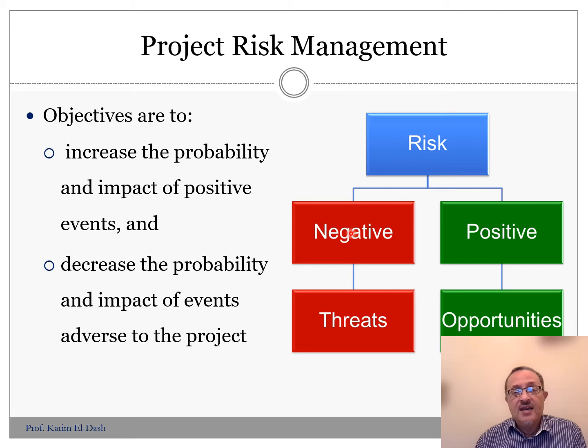And for sure, it is a negative risk. How about positive risk? The opposite. How about if the prices are decreasing like 20% or 25%? Actually, it is very rare, but it might happen. If the prices are decreasing like 1 or 2%, that's accepted, and that's already the responsibility of the planner from the very beginning. But if the prices are decreasing like 20% or 25% or more than that, that's the responsibility of the risk manager and the risk management team.